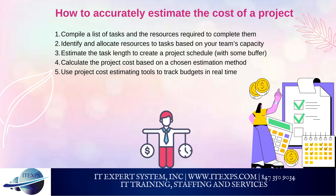First, compile a list of tasks and the resources required to complete them. Second, identify and allocate resources to tasks based on your team's capacity. Third, estimate the task length to create a project schedule with some buffer. Fourth, calculate the project cost based on a chosen estimation method. Fifth, use project cost estimating tools to track budgets in real time.